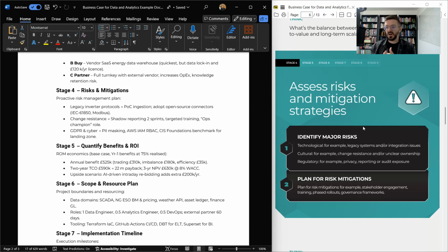Is there, like, I delivered a project at an energy organization, and the NIST directive meant that actually their internal IT team were just really overburdened with some of the changes that they were going through, which meant they couldn't dedicate the time to the project. It was a huge risk that we identified, and we had to mitigate by having cadence and check-ins and doing things in a slightly different way. Identify those risks and then just talk to each of them.